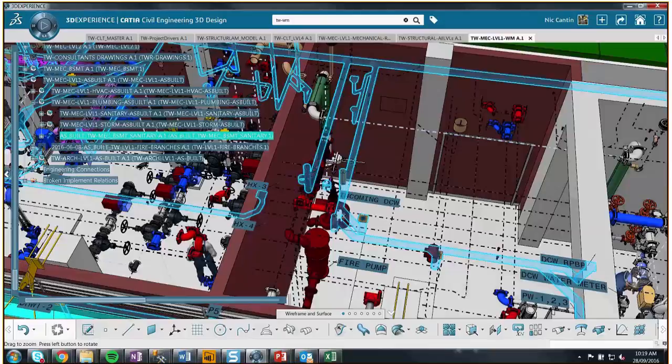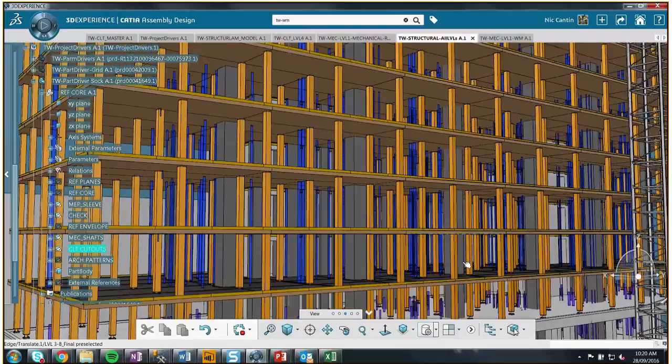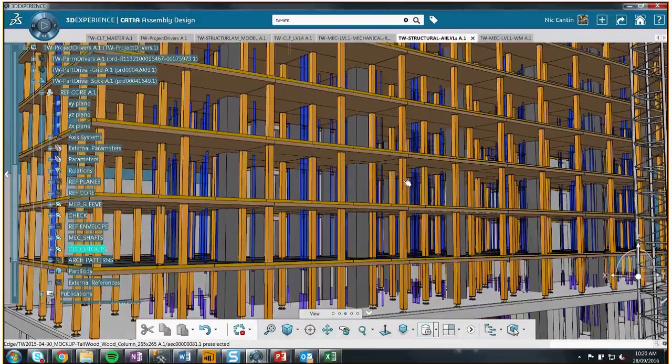So the big risks were wood, concrete to wood elements. Everything with that prefab wood was connecting to concrete. And obviously cores aren't perfectly vertical as you go up. So this is going to be heavy. Anyways, on the cores, there's angles for the CLT to sit on. And on site, they were surveying every week.